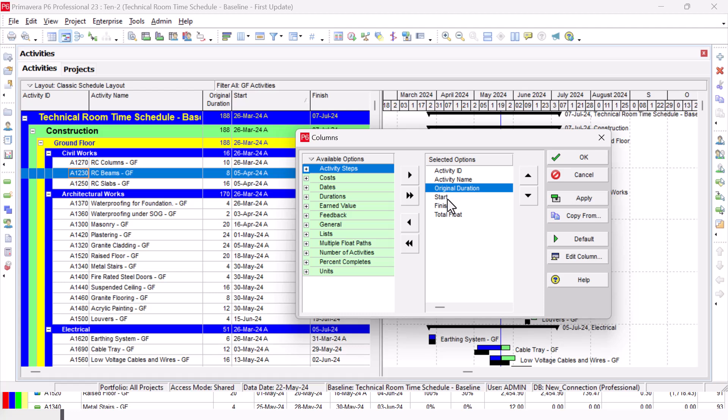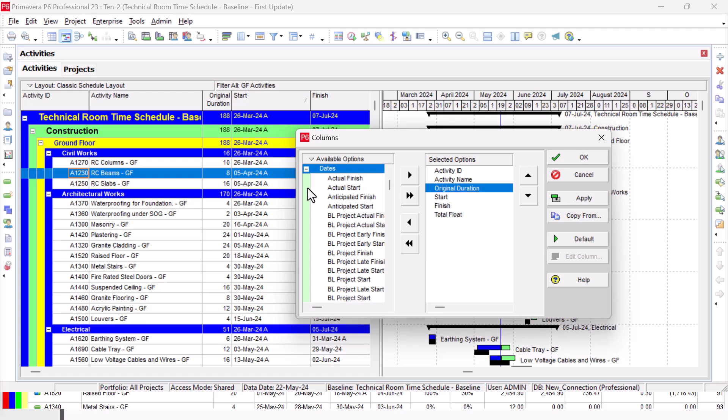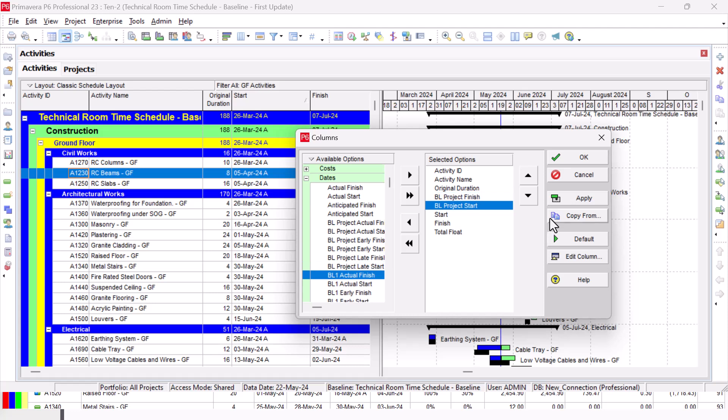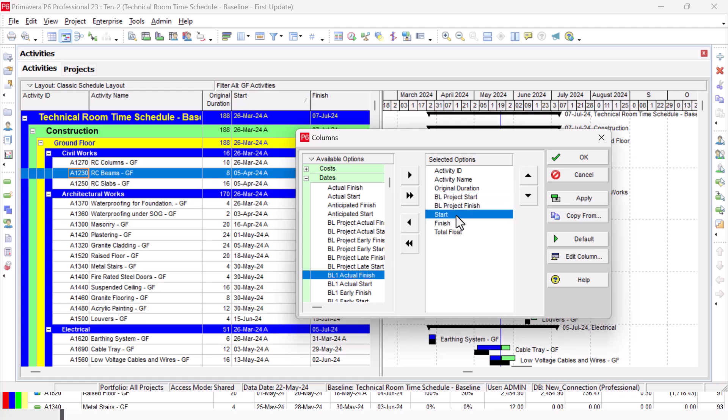Now I need to show the planned start date. From Dates here, I can find it. Plan Project Finish, Plan Project Start. Now I can rearrange them. I have Start and I have Finish. Now I have the start and finish which give me dates for the updated schedule.